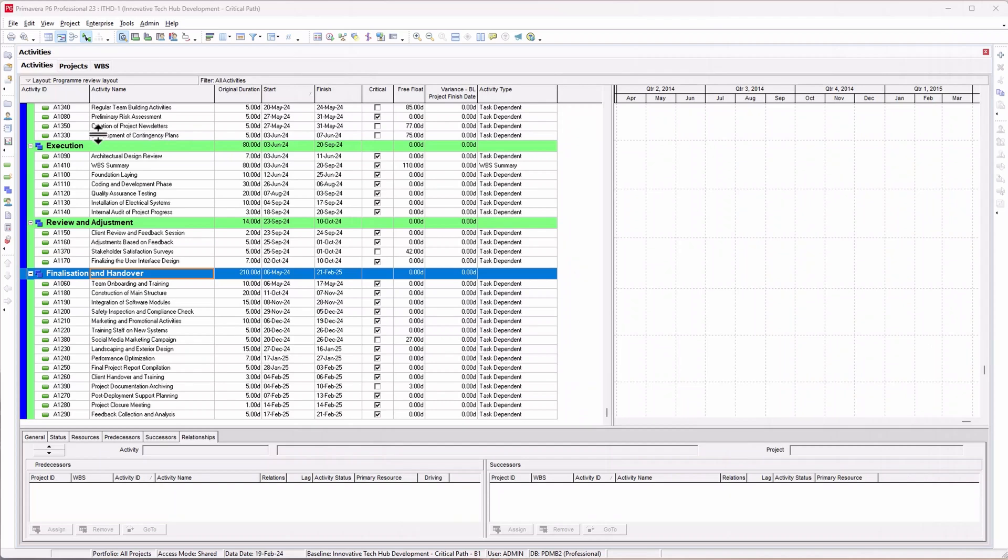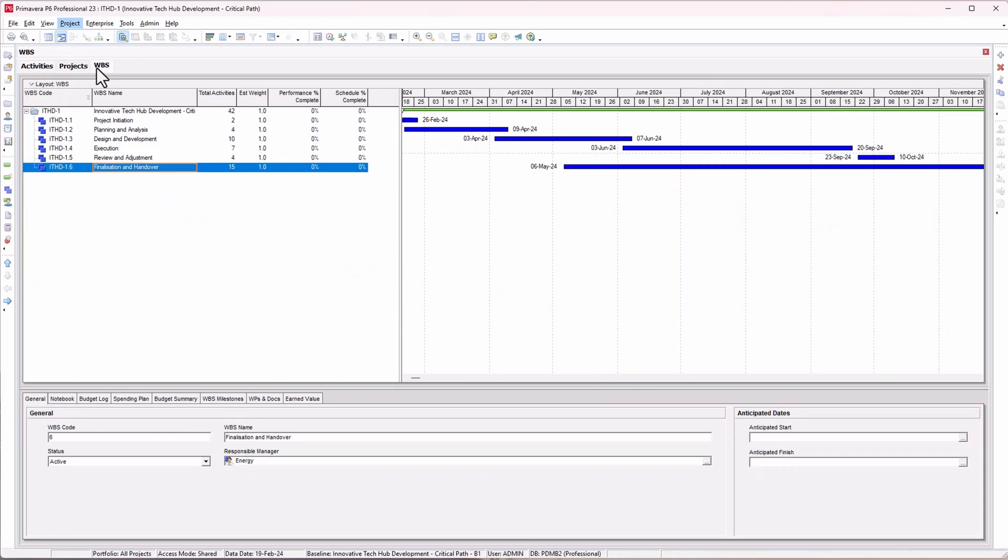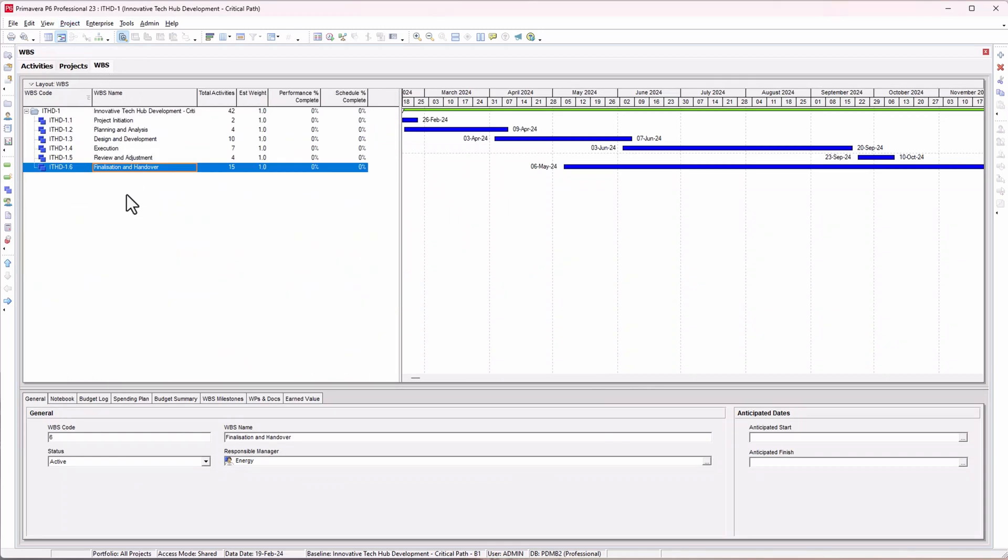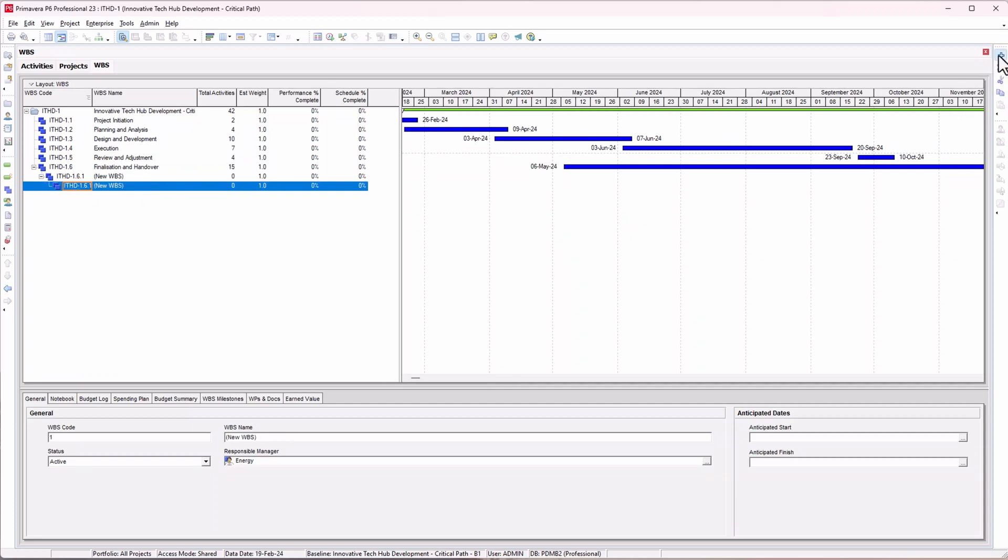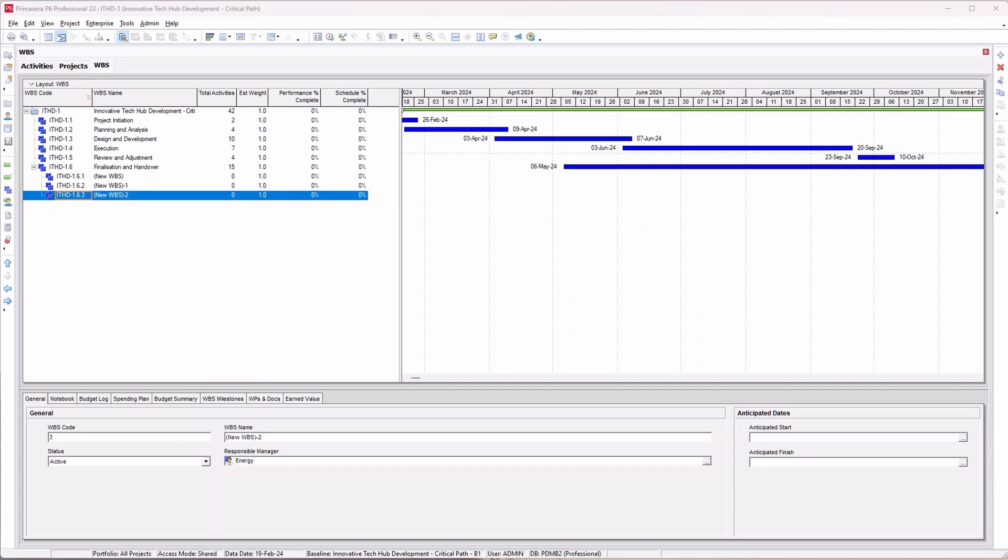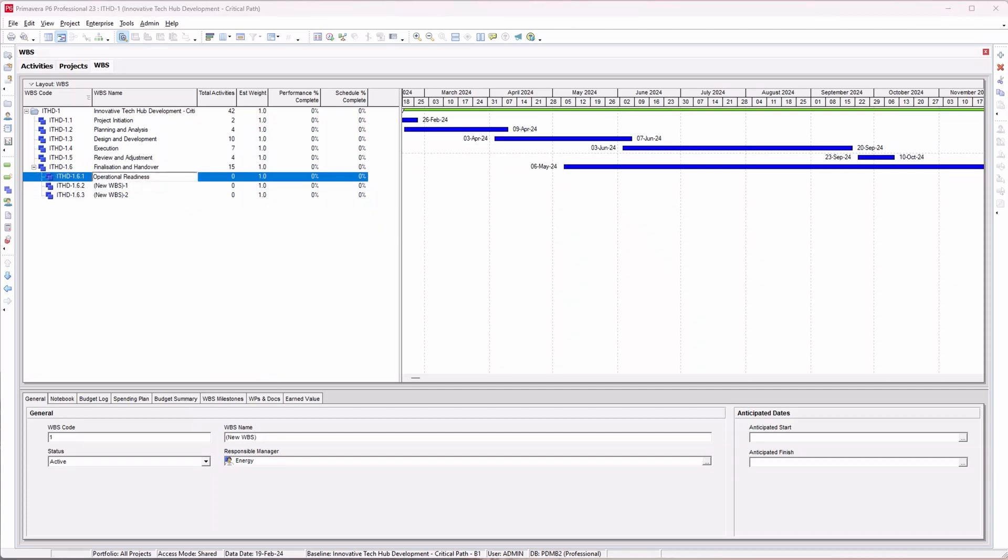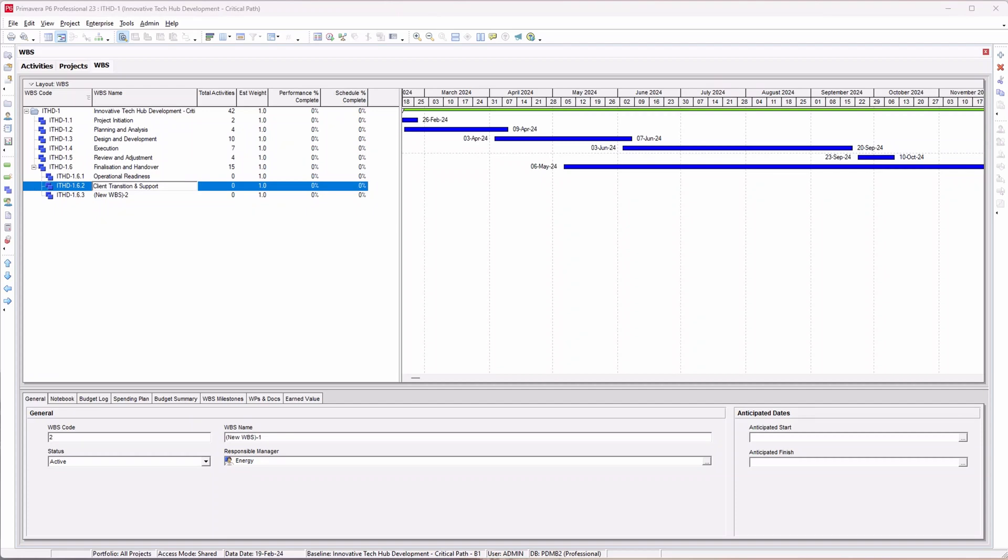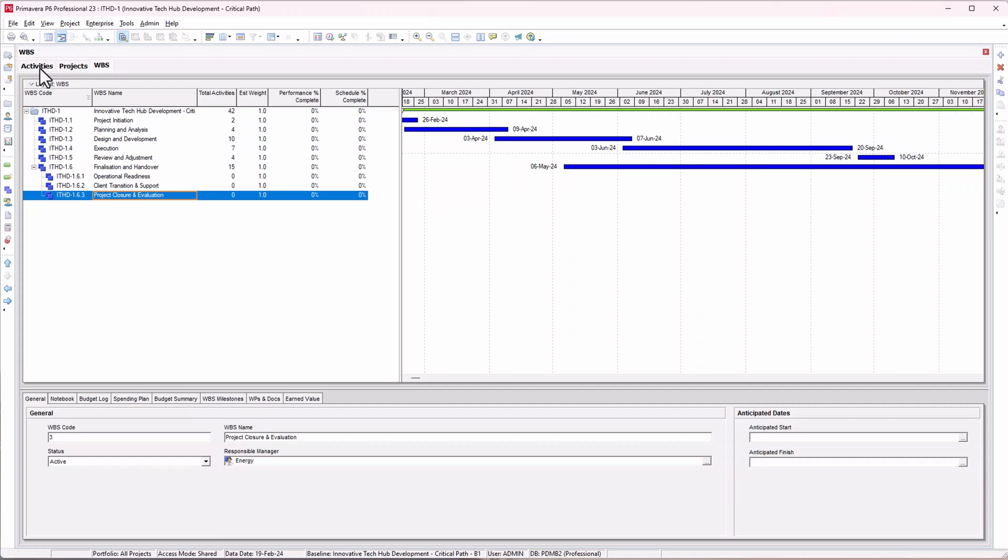What I need to do is press the WBS icon or go to Project and click on WBS to take you to the WBS view. I want to add those WBS to this final activity. Click on these three times, then move the WBS to the left so they're on the same level. Copy and paste the names: client transition and support, and project closure and evaluation. I've got my three WBS here.